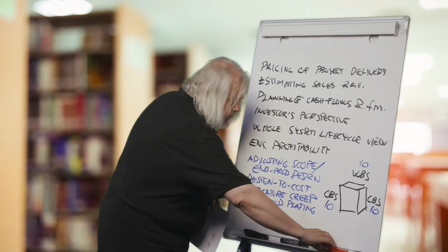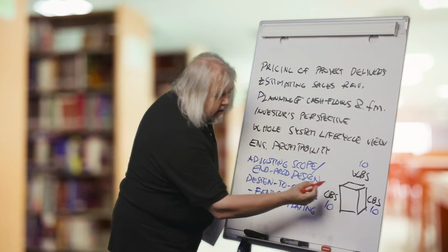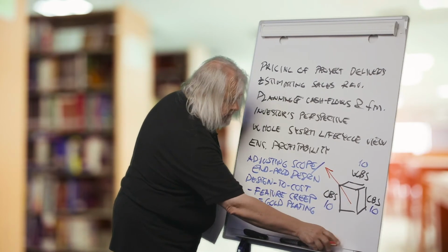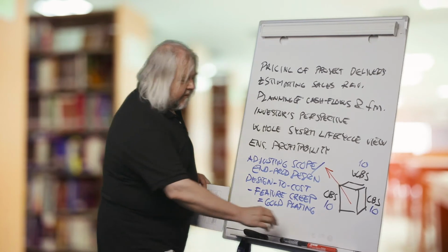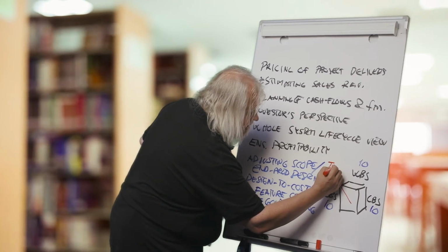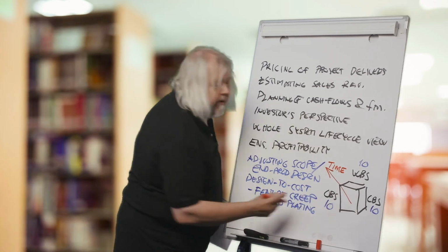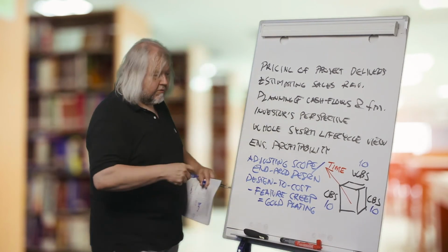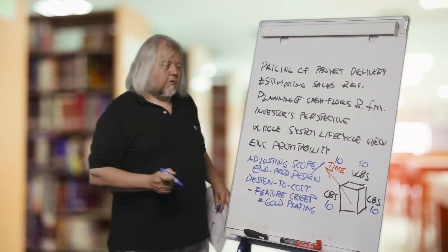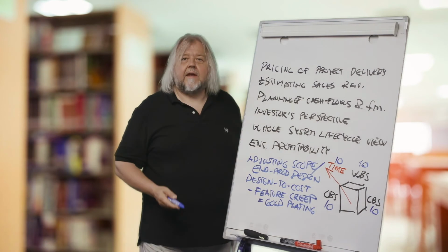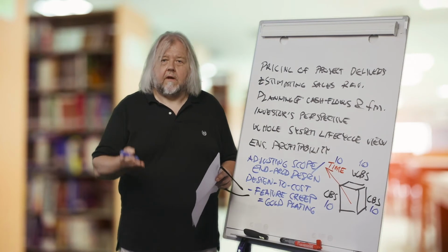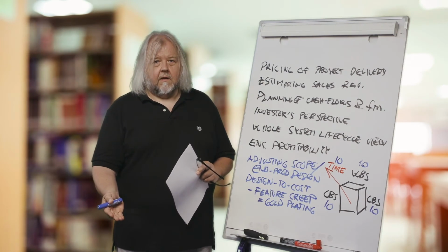And then we have a short project, and I draw here a fourth dimension. It's difficult to imagine how the fourth dimension should be drawn, but let's say that we have a fourth dimension of time, and we have in this project a 10 month duration. So we have 10 times 10 times 10 times 10. We have 10,000 positions where we can record costs or even go to budgeting at that level.